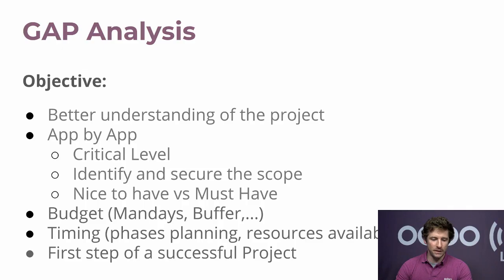With the gap analysis, you will also be able to identify and secure the scope of the project. This is really important because a common reason for a project to fail is that the scope of the project wasn't properly identified.